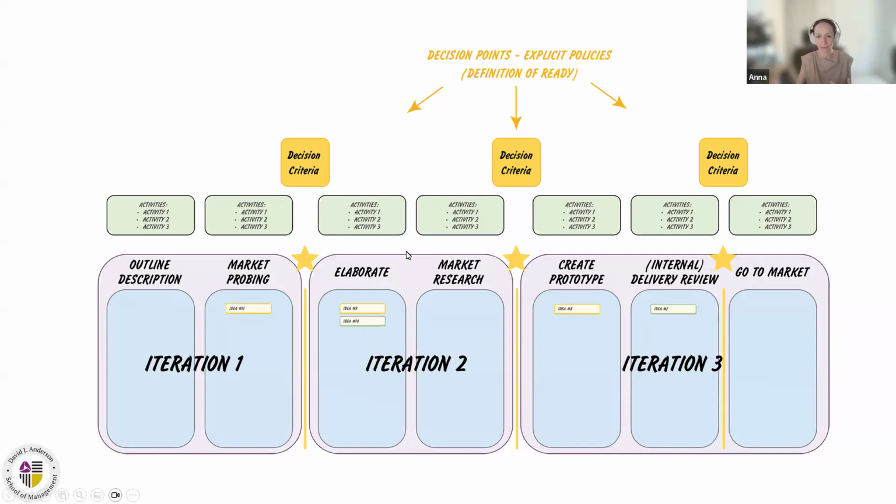If we say, okay, this is our decision point, we want to invest in it, we do the next round. We elaborate, we write a bit more, we write learning objectives, we try to figure out what should be in this class. Now we get more detailed information, and we do more detailed market research, reaching out to our clients, to our students, to some of the trainers, to figure out whether they need to have this class in place. If it says again, okay, we should invest in it, now the real work starts.